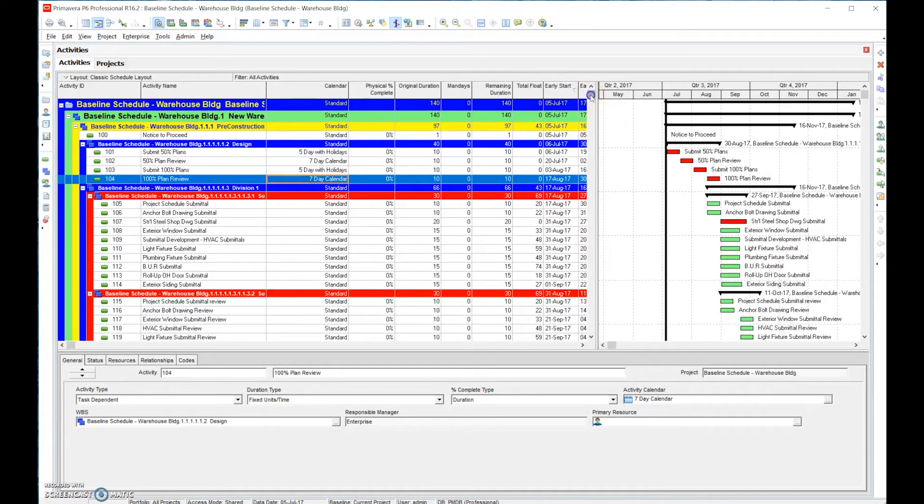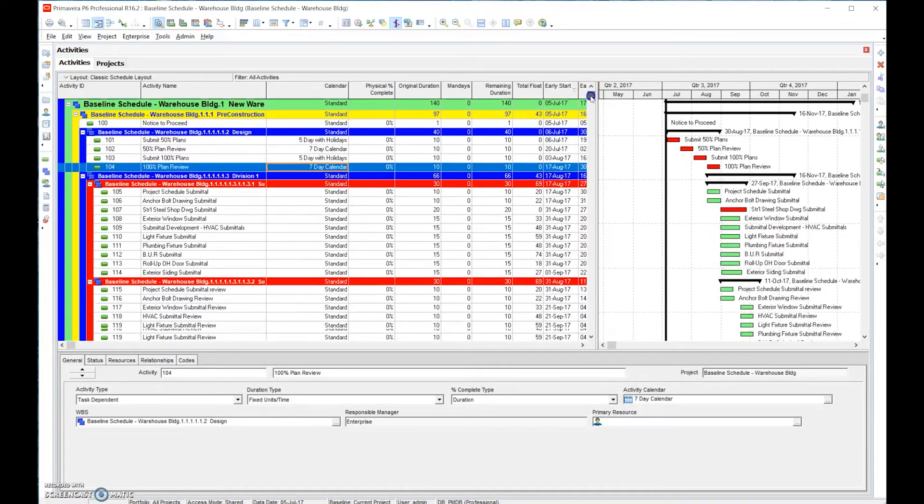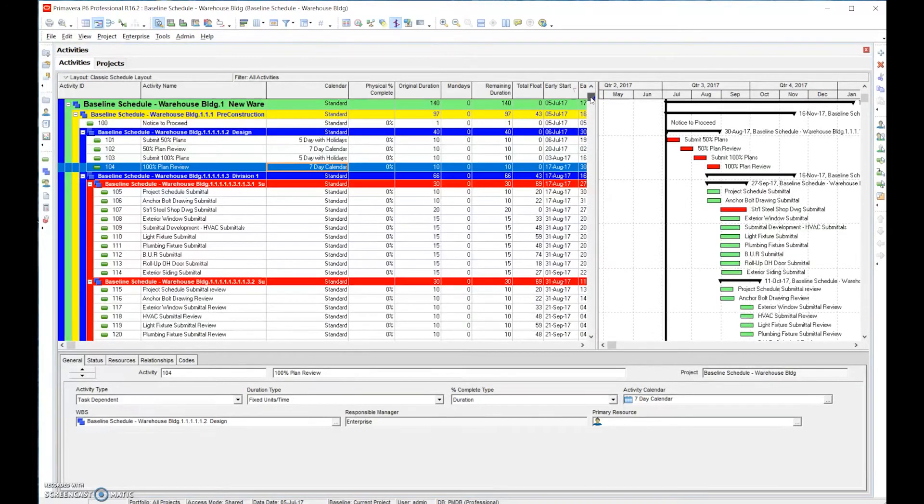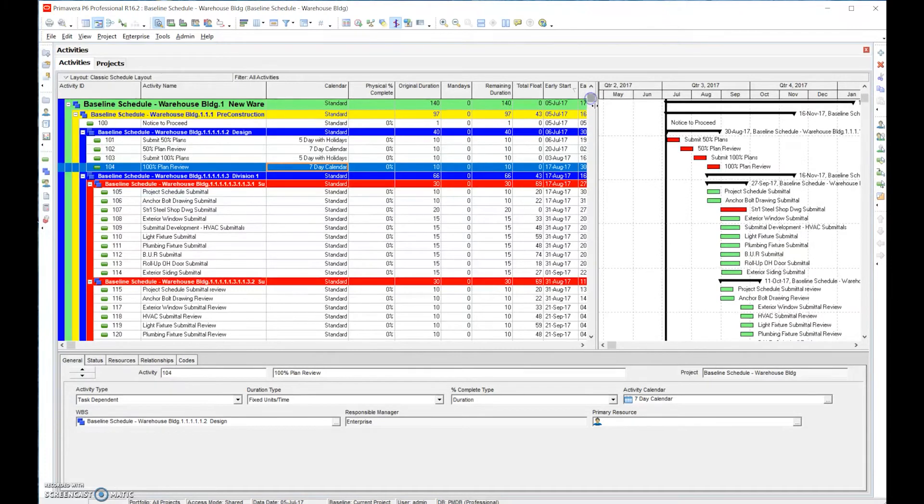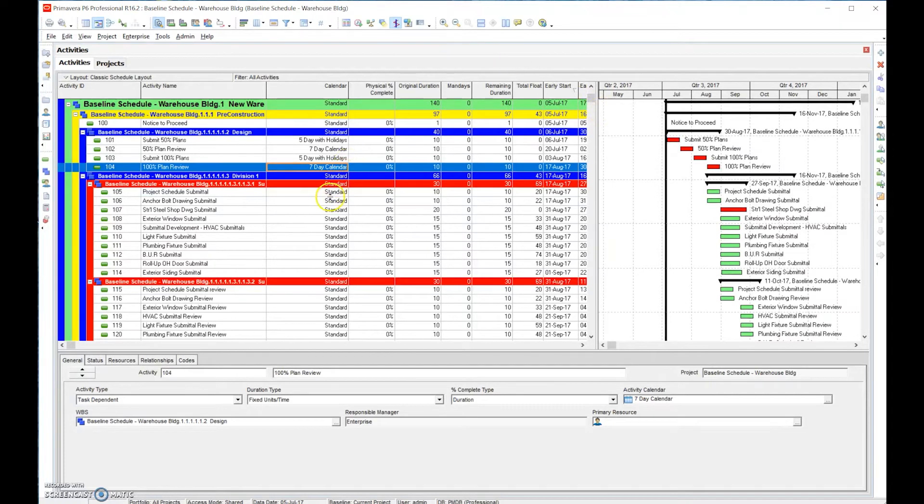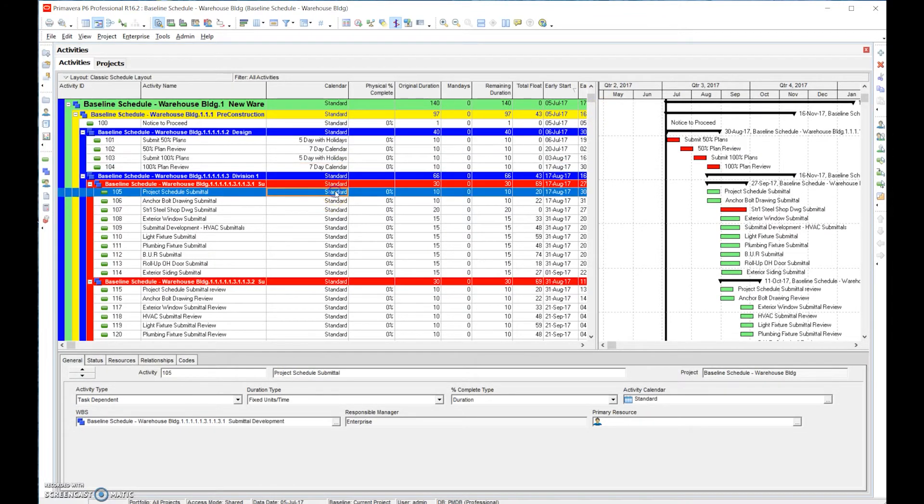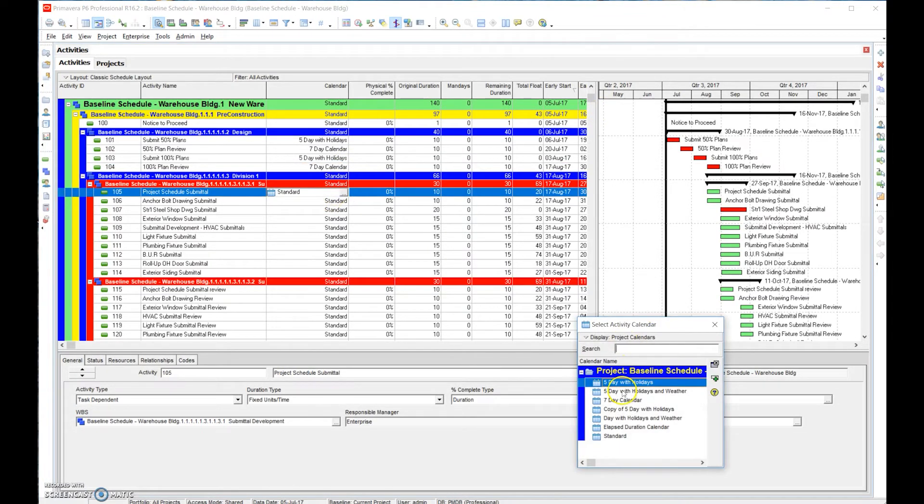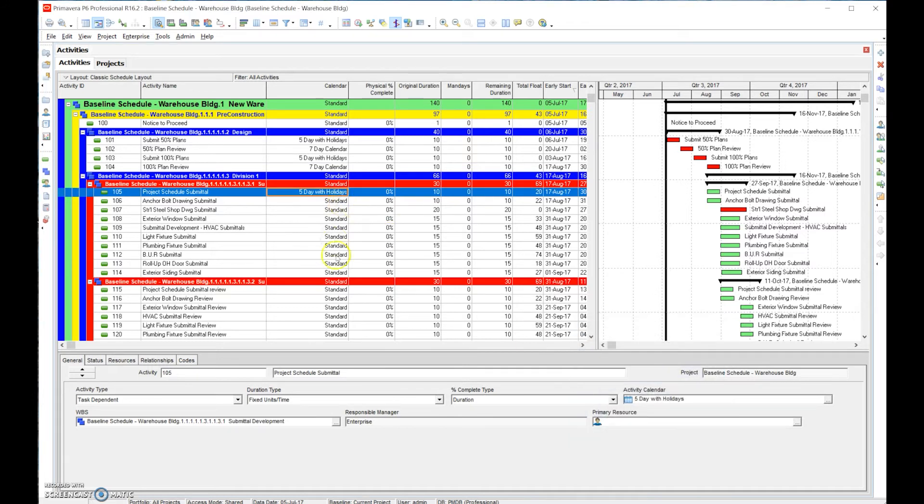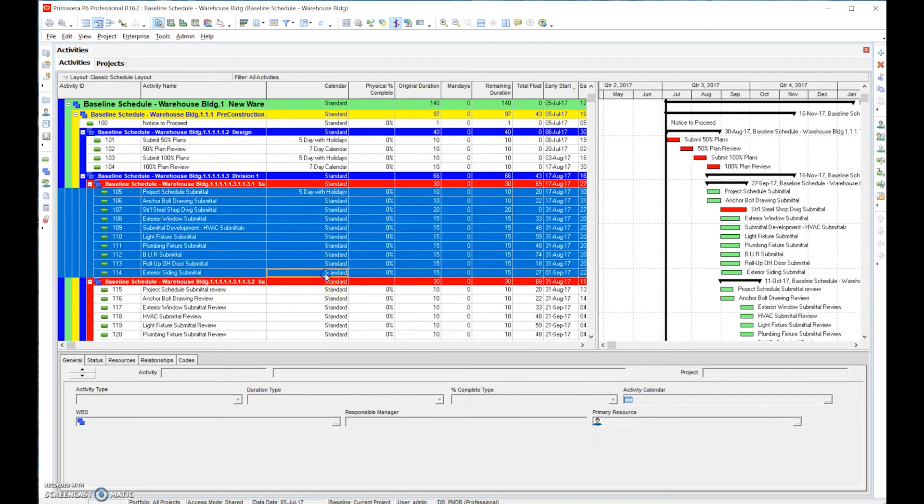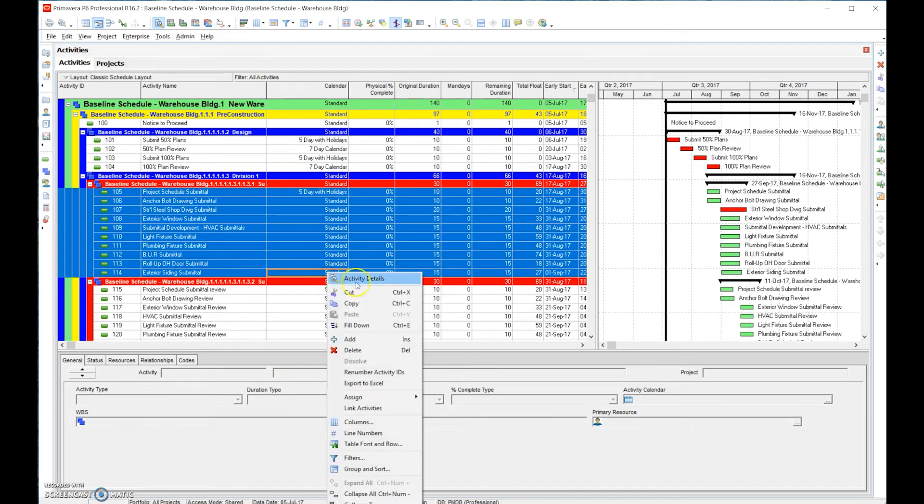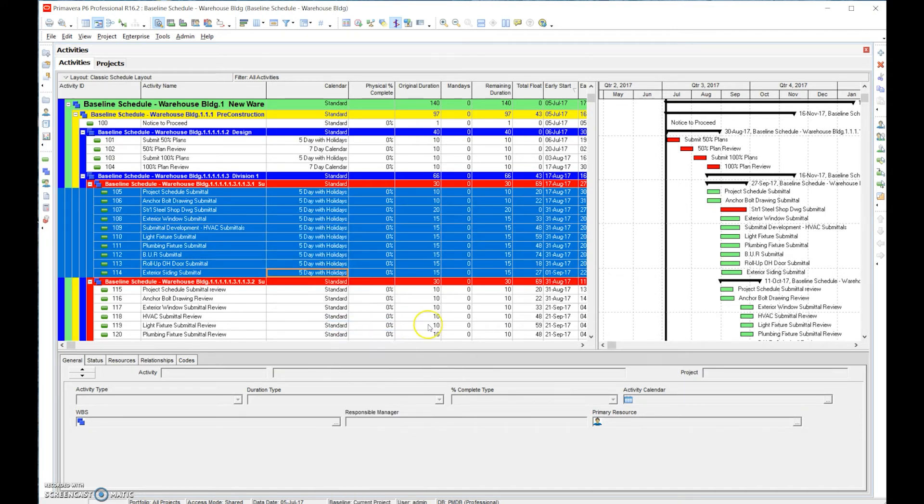Once again I'll walk through that fill down - I think it's very helpful. If we walk in and say okay here are all the submittals. These are not submittal reviews, these are just the submittals, so they're gonna be on a five day. We can double click there, five day with holiday, and then we just hold down the shift key to the bottom, right click and we hit fill down.